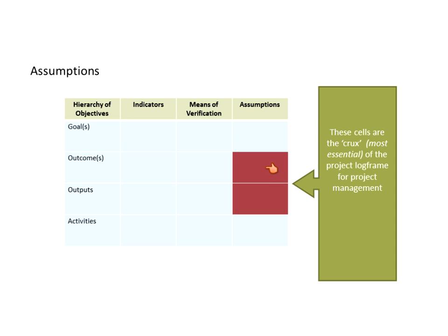However, even more importantly, each assumption in the log frame needs to be turned into a negative statement, and then it should be used as the start of the risk management strategy or the risk register. So every assumption in the log frame becomes a risk, and that's the start of your risk management strategy.